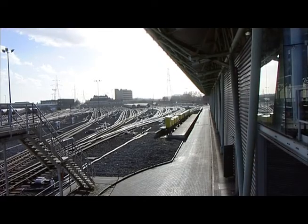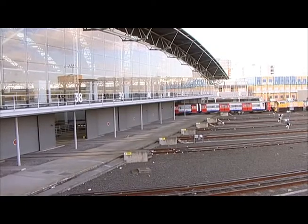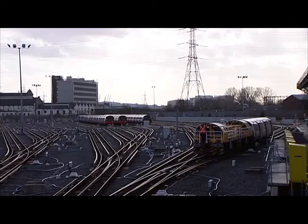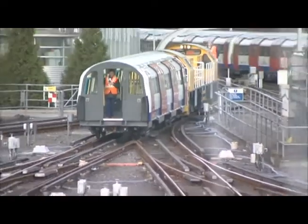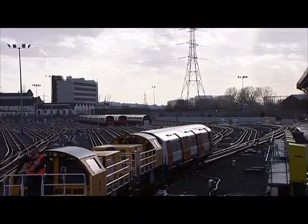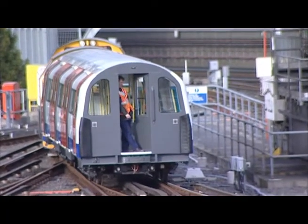Much of the infrastructure for the Jubilee Line will be adjusted prior to December 2005. In spite of this though, there are many changes that simply cannot be carried out while the existing 6-car formation trains are running. The final changes needed will take place during a 5-day passenger closure over the Christmas period between the 26th and the 30th December inclusive.